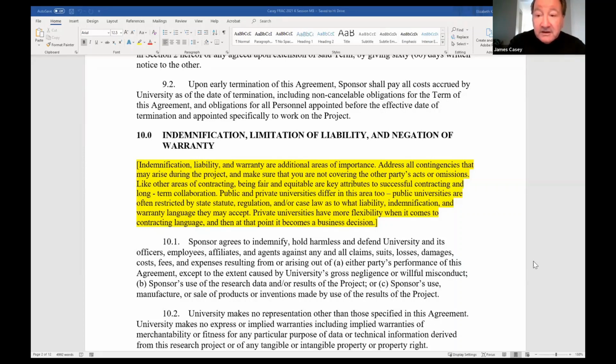And that does lead to saying, hey, we can't do this work because of the pandemic. We are invoking the force majeure clause. And if it's a delay, that's one thing, but that may need to be a termination also, depending upon the project. The pandemic, COVID-19, is significant for these reasons. And I'll talk about that a little bit more in a minute.